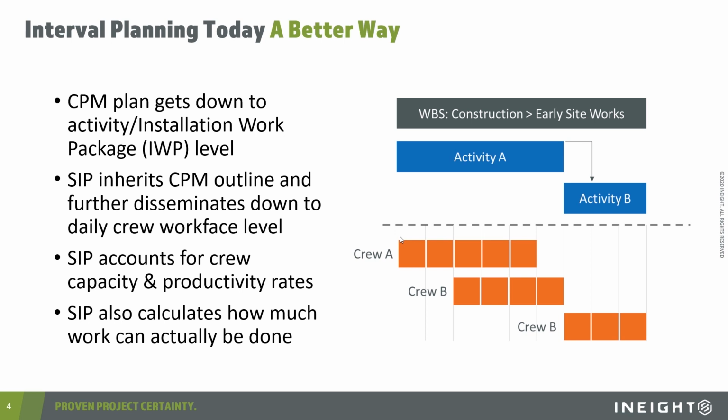Because in the field, the steps or tasks can oftentimes be rearranged, moved around, split up, waiting for material or equipment. It's a more free and dynamic environment, and a more free and dynamic means is needed. As long as those details stay within the activity boundaries set out by the CPM plan, then all is good.